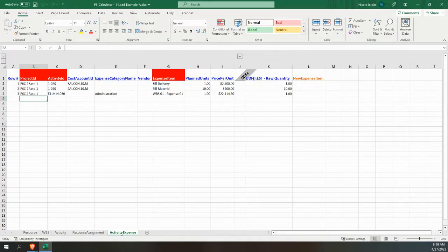Other sort of inspections that don't necessarily have to be against a limit. Perhaps site trailers, or perhaps internet costs. There's all sorts of costs that don't necessarily have to be a resource, okay? So those could fall into an expense. And again, we would normally like to be using cost accounts to marry this up, okay?